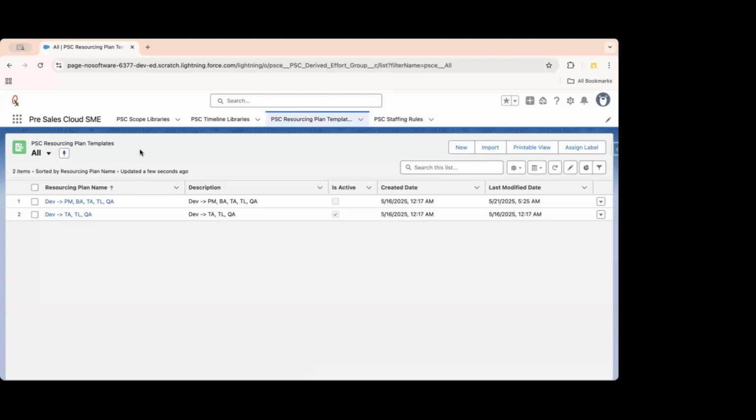So for building a particular page, let's say a web page, a developer would take 40 hours. We know that very clearly, right? The next thing is the supporting roles around it, because when we do a project, even if it's a transformation project and not a staffing contract, we don't sell just a developer.